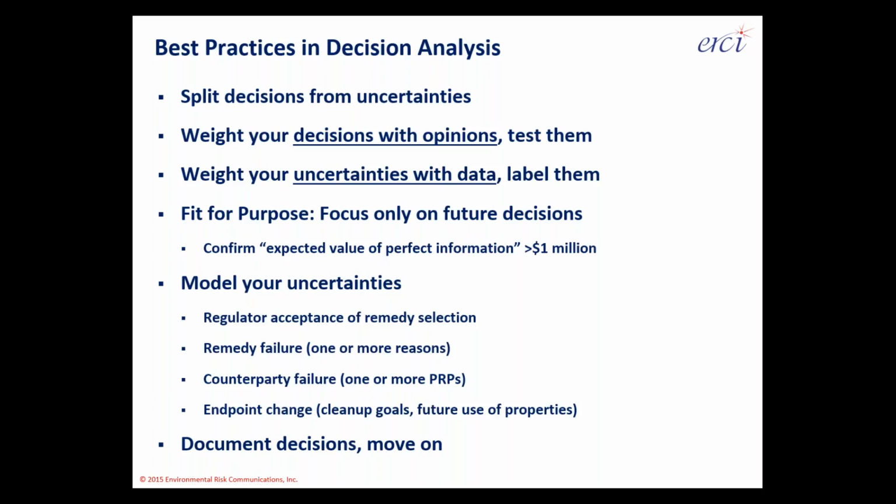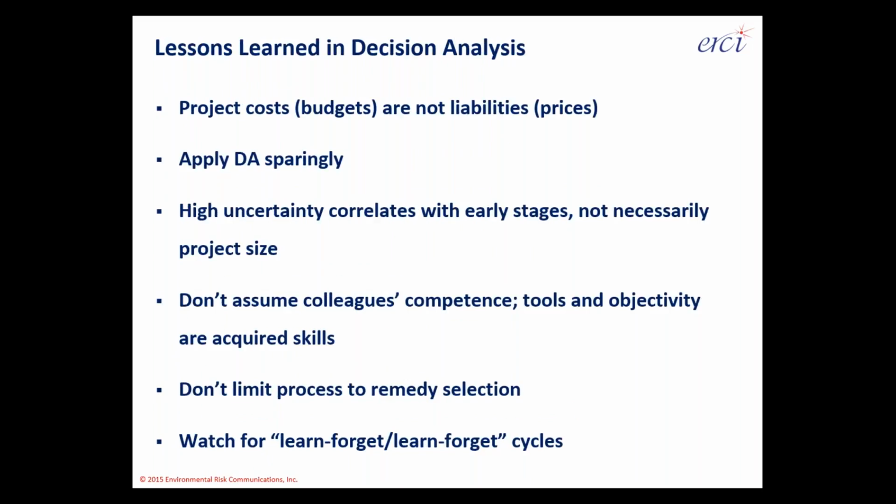Documentation is pivotal to making sure that you're able to understand your decisions today, but also look back on them and improve them tomorrow. The lessons learned that ERCI has to share with you today are, again, keep in mind that project costs, the budgets, are not the liabilities. DA needs to be applied sparingly. Decision analysis is a great tool, but it isn't great for every situation. High uncertainty correlates with early stages, but not absolutely with total project spend.